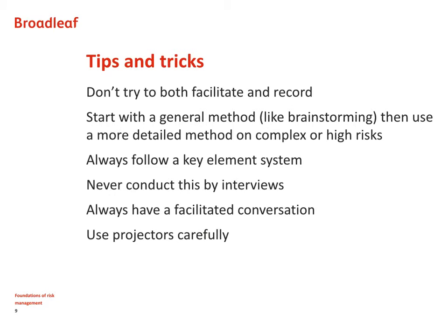It is almost impossible to produce a coherent, balanced and comprehensive set of risks through a series of interviews. You do need the people in the same room discussing these matters to remove bias and also to branch from one another and build their understanding of the risks. So always have a facilitated discussion.